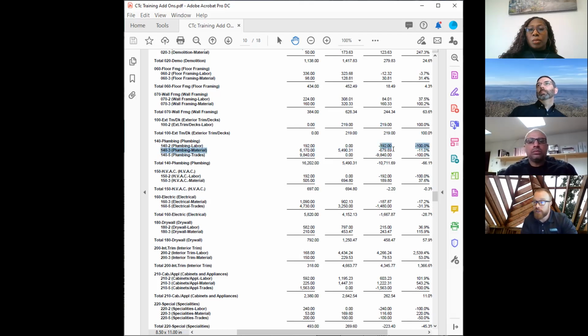So when you look at that, right there, currently where we are in the job cost when this was snapped, you have to assume that we're going to need another $680 worth of plumbing fixtures to be purchased. If you ever see that line item over budget, then that's just a red flag. You would circle that and get with Beth to understand what it is. But then the PD should know if we're ordering something that's more expensive than in the budget ahead of time. So those are all just indicators for conversational purposes.